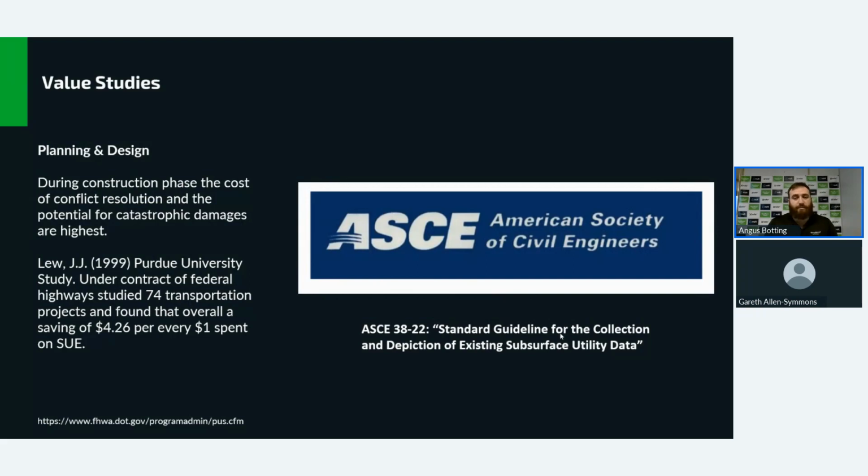Now, we'll go through some other projects in a minute that have varying numbers, but the main takeaway here is you are doing an upfront investigation at the beginning of your project that does add to the planning phase, but it saves you down the line. And you're saving money when it comes to change orders and things once it gets to contractors, construction, in the areas where the costs really add up. We're talking about spending a smaller amount in the design and planning stage to save us down the line.